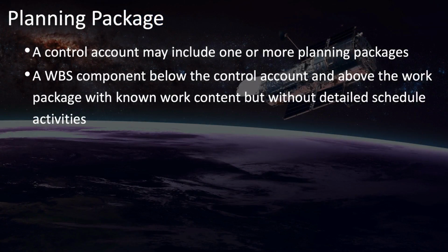Your work breakdown structure can also include what are known as planning packages. Your control accounts can include one or more planning packages each. The planning package is a component that is below the control account, but above the work package. So it's in between, in the middle, between the control accounts and the work packages.